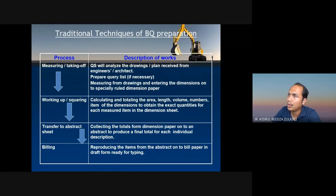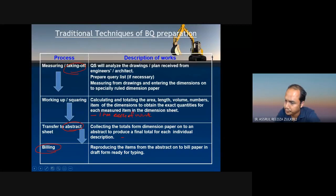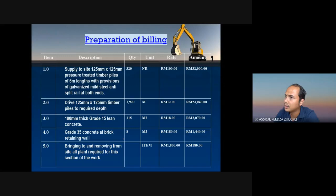The traditional techniques in BQ preparation — previously I mentioned how to prepare the bill of quantity. They start with taking off, then do all the calculations for each item of work, and then you need to do the abstracting. Abstracting is to put every work item, classify each work according to its respective category. That is abstracting, and then the process of billing and producing a BQ.